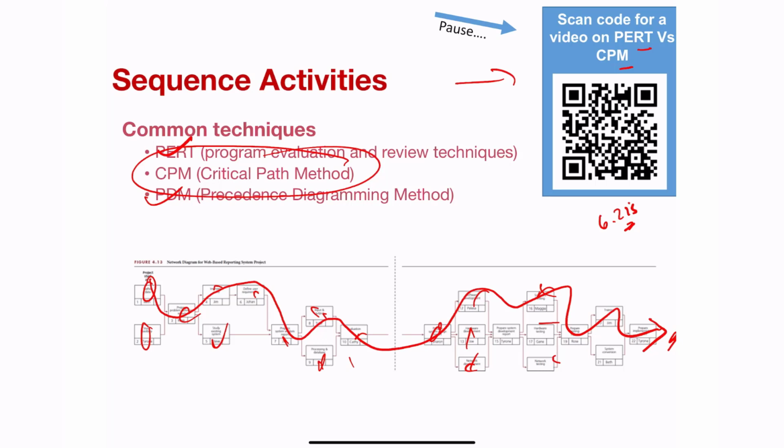And generally, always, that list of activities is the longest path through your network, meaning that if you string all of those activities one next to the other and you add up all of the time, say activity 1 takes 5 days, activity 2 takes 3 days, if you add all of that time together, that will be the longest period through the entire network. Why the longest period? Why not the shortest one? So it is quite counterintuitive.